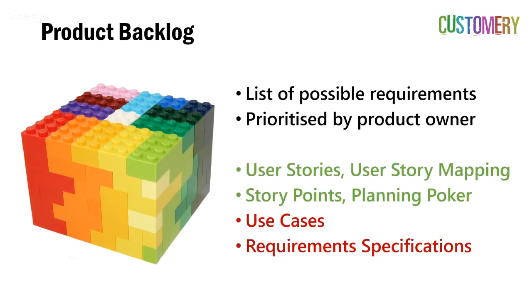When it comes to estimating and planning, I recommend using story points and planning poker. A story point is just a relative estimate of effort or complexity for each user story. And we use a Fibonacci sequence there, 1, 2, 3, 5, 8, 13, and so on. That allows us to estimate the effort it's going to take to implement any particular user story. And we come up with those estimated story points in a gamified workshop called Planning Poker, in which the development team sit around, and it's only the development team who get to estimate the effort. Nobody gets to see anybody else's cards. We all reveal our estimates together, and we negotiate why somebody thinks it's a 3 and somebody else thinks it's a 5 until we come up with a group consensus.